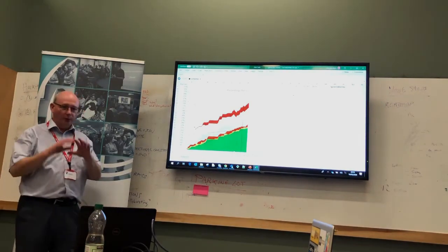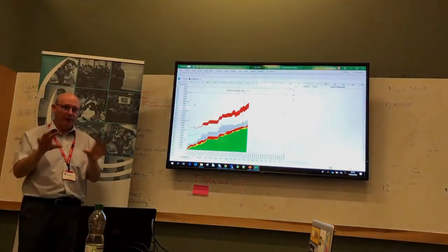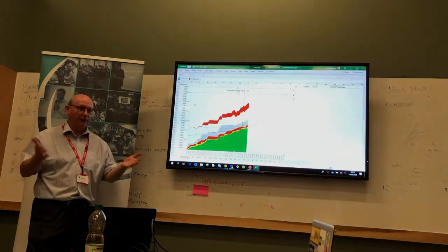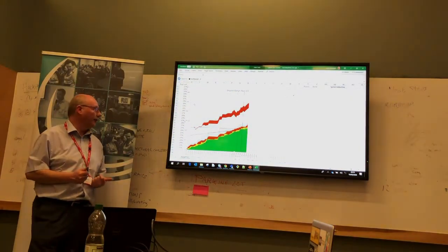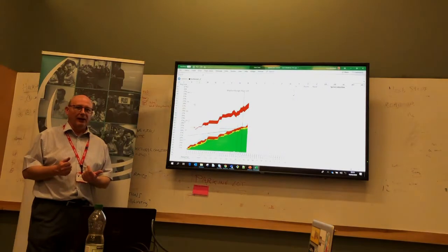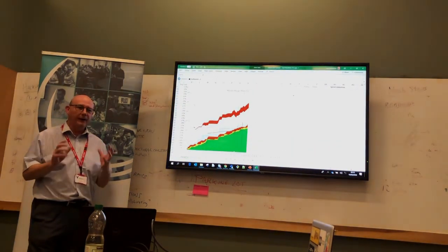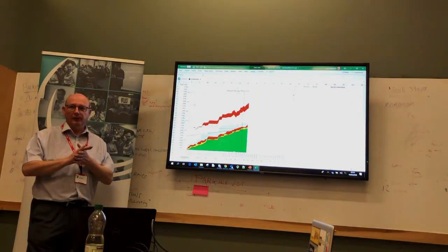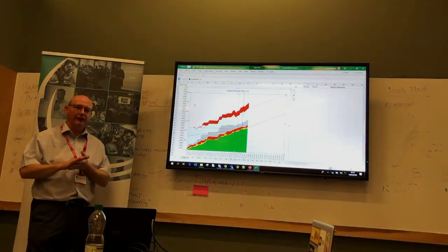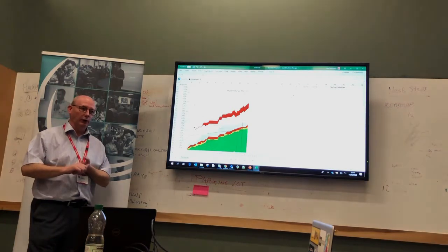Along the lines of 0.1, we would just get our grid up on the screen so that people could play with it and find out how they could interact with it. It's a grid pattern product. 0.2 was to enable essentially save and load. 0.3 is a very minimum viable product. And then 0.4 and 0.5 mostly add things like admin and the ability to view the logs and stuff like that.